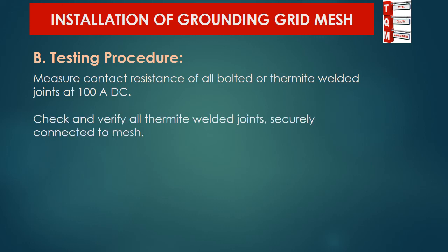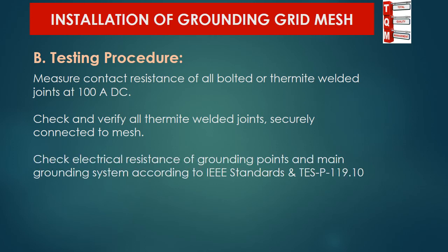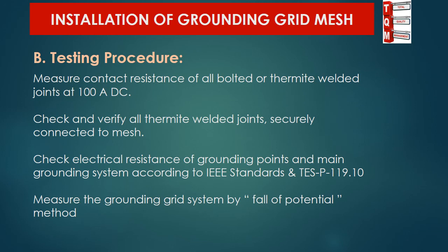Number 2: check and verify that all thermite welded joints are securely connected to the mesh. Number 3: check the electrical resistance of grounding points and the main grounding system according to IEEE standards. Number 4: measure and test the grounding grid system by the fall of potential method.